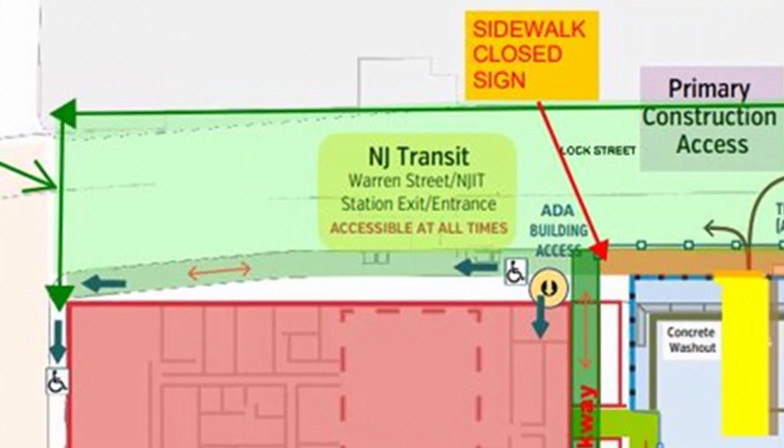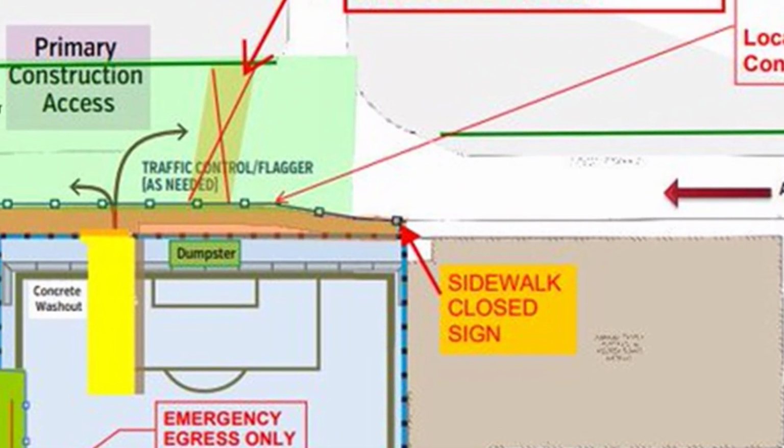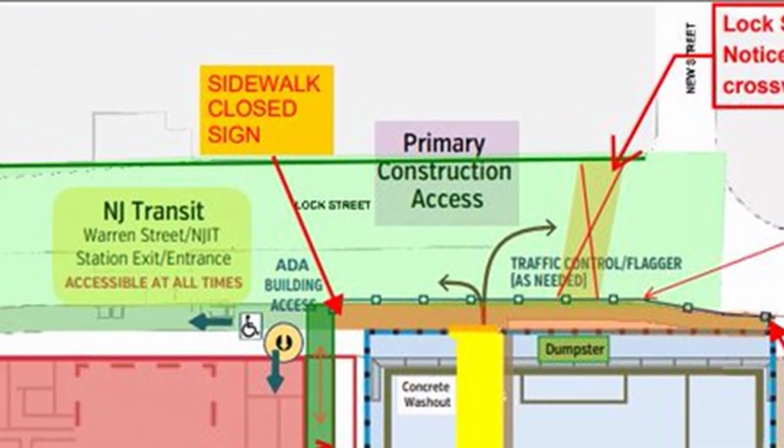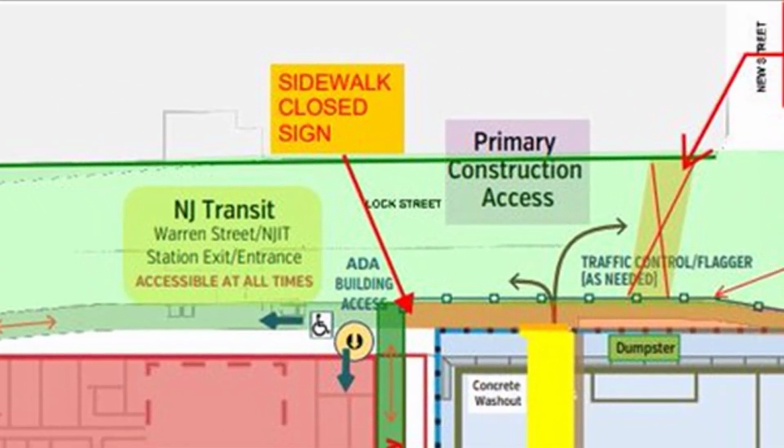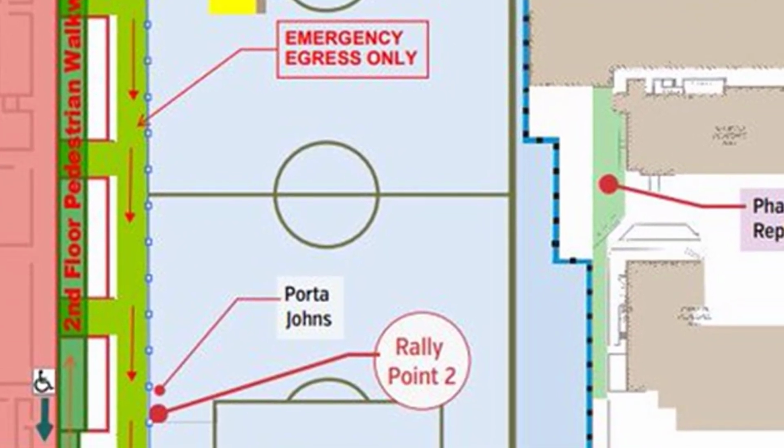Now, we need to think about if we're going to put our job site trailer over on this side of the job site, and there's a big haul road right here, and then our job site's over here, we're going to have personnel movement across that haul road all day long. Is that the safest thing to do? Or can we do it a different way? Be thinking about personnel movement on the job site and show that on your job site logistics plan.